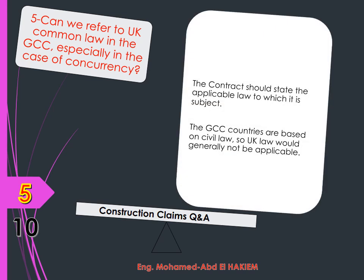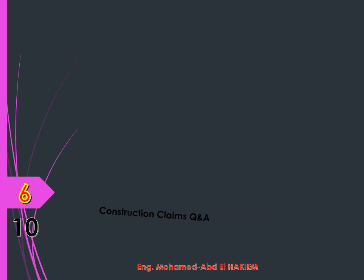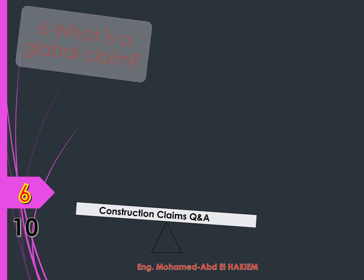Question 5: Can we refer to UK common law in the GCC, especially in the case of concurrency? Answer: The contract should state the applicable law to which it is subject. The GCC countries are based on civil law, so UK law would generally not be applicable. Having said that, case law may sometimes be applied across legal jurisdictions, especially when it deals with technical rather than legal principles. A good source of reference is the Society of Construction Law's Delay and Disruption Protocol, which deals with concurrent delay.